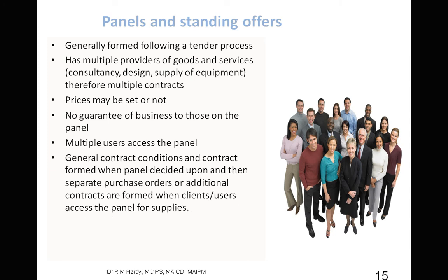Now, the panels and standing offers are really a way for suppliers such as builders and architects to be in the running. For small things, with standing offers, this may be hourly rates. So if something needs to be done, the university can come to a builder and say, this is going to take 6 hours, will you do it?